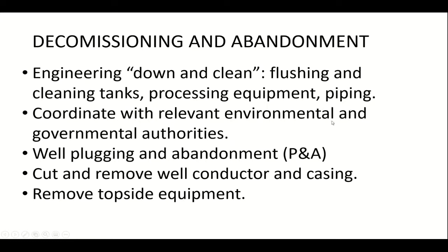I have to coordinate with environmental and governmental authorities that the field will be shut down. One major and critical activity here is to plug and abandon wells, often called P&A, and the government takes a big chunk of this cost.